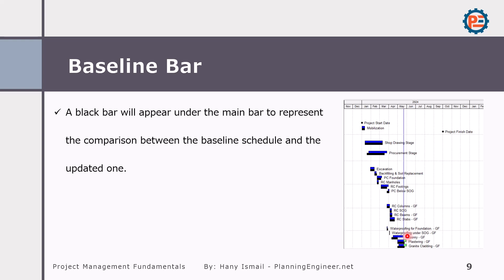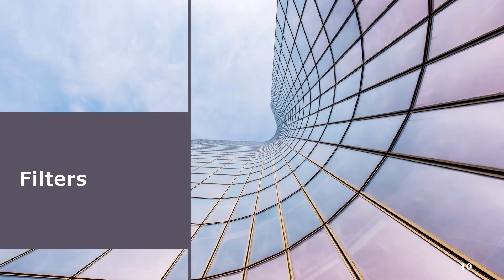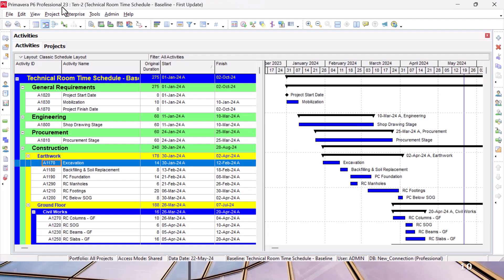Whatever is after the data date means it is forecast. We might see here something green - it means this activity is not critical. If it is red, it means this activity is critical.